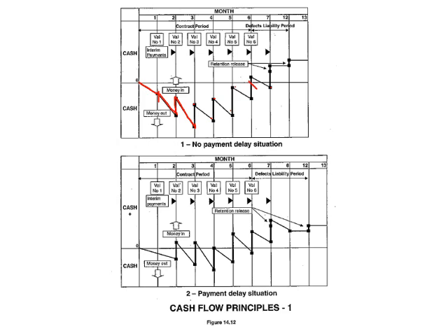Okay, so this is a no payment delay situation, but if you can negotiate with your suppliers and your subcontractors that you pay them only later on, you can see how this trend of cash outflow is alleviated, so that it doesn't go down as sharply as it went down here in normal circumstances. So you can see after the first month you're actually getting a bit of a positive cash flow, and then you dip back into that, and overall your cash flow deficit is much less.